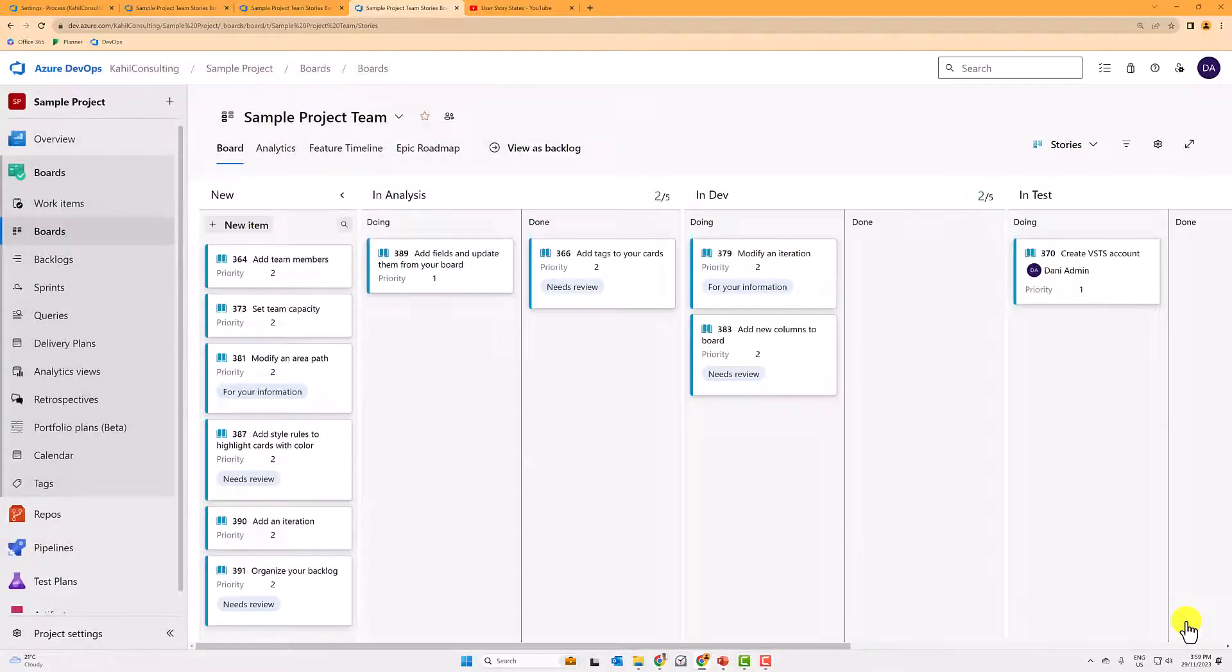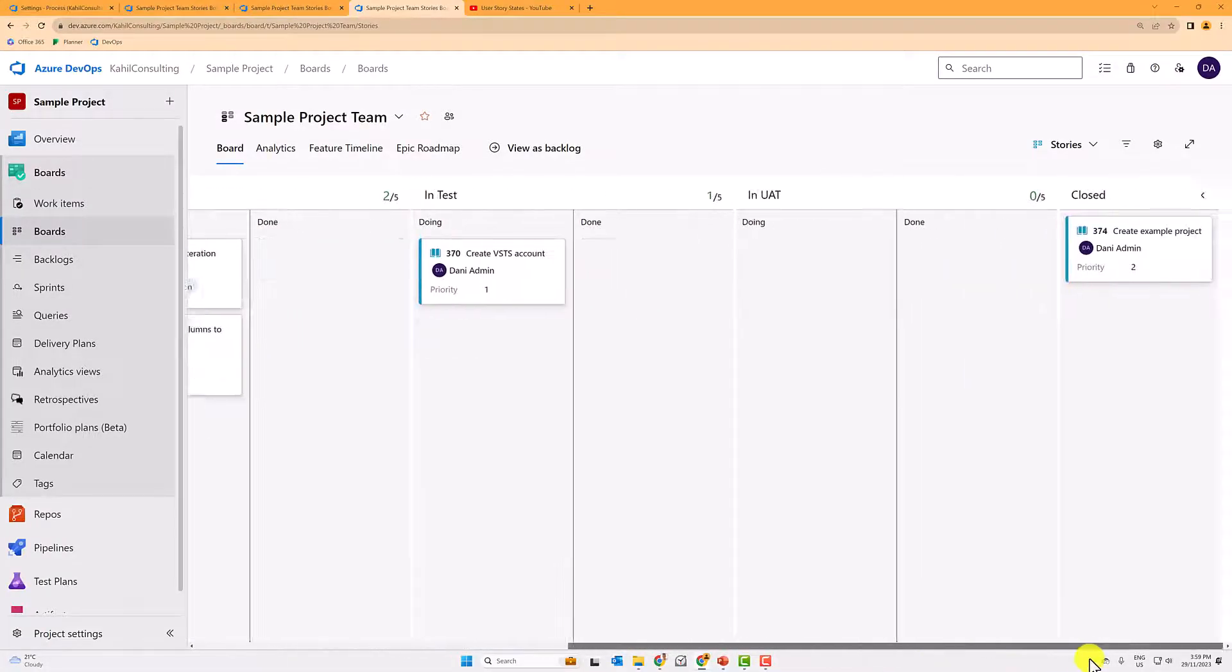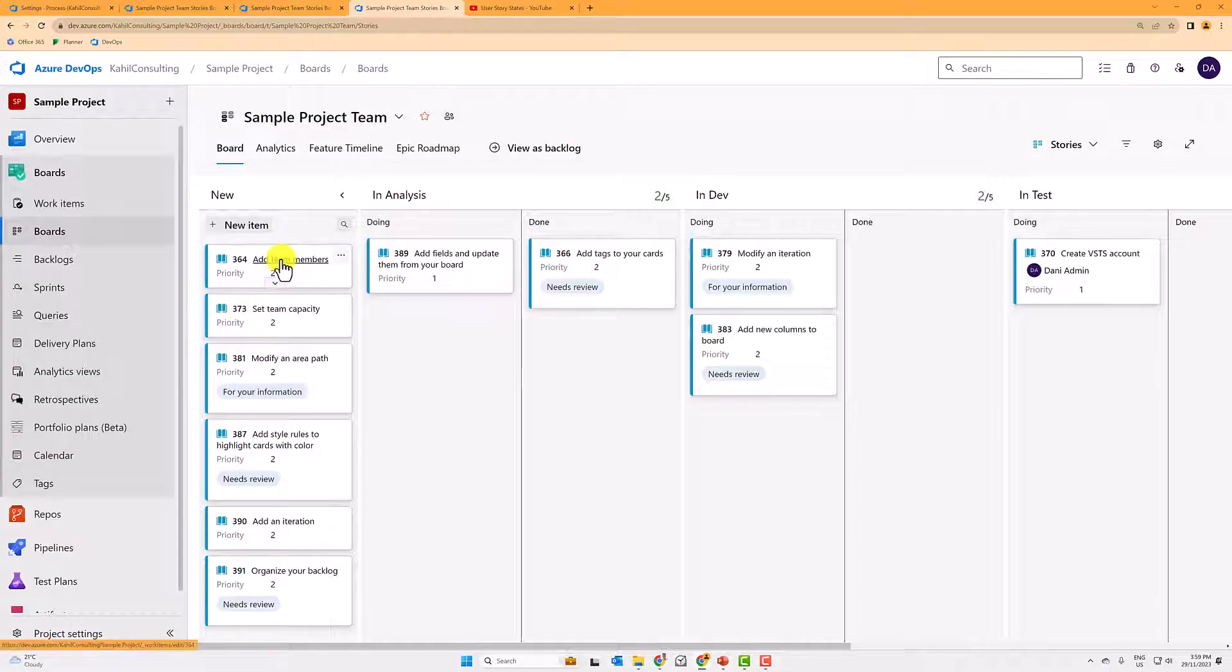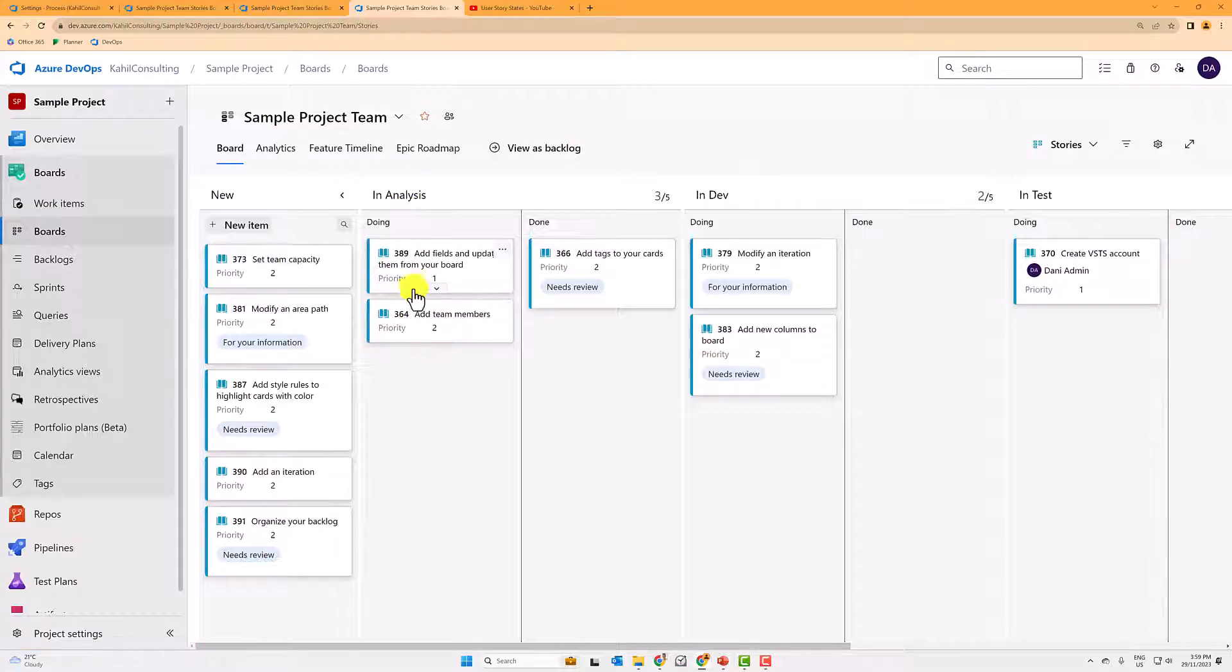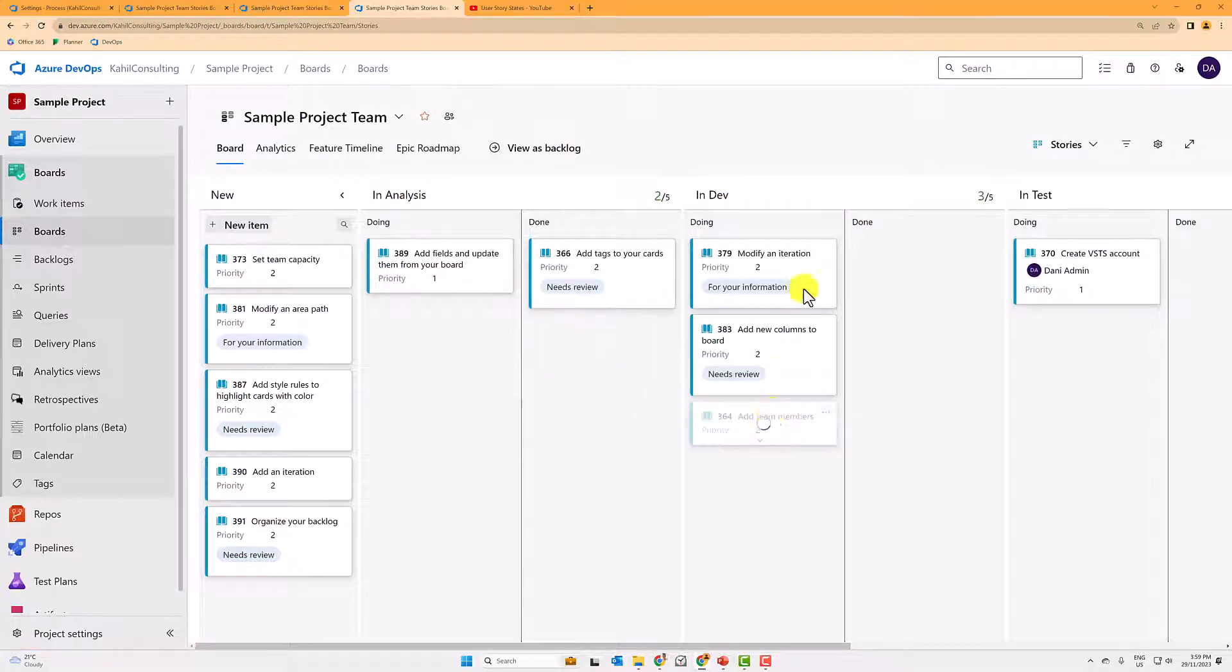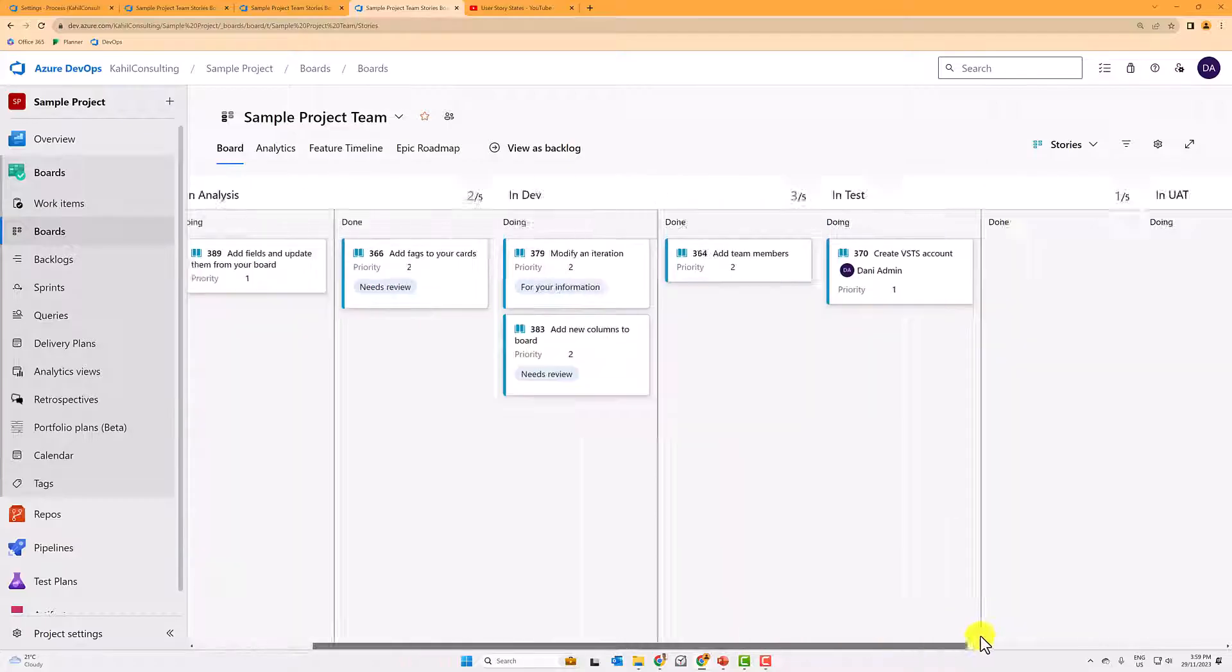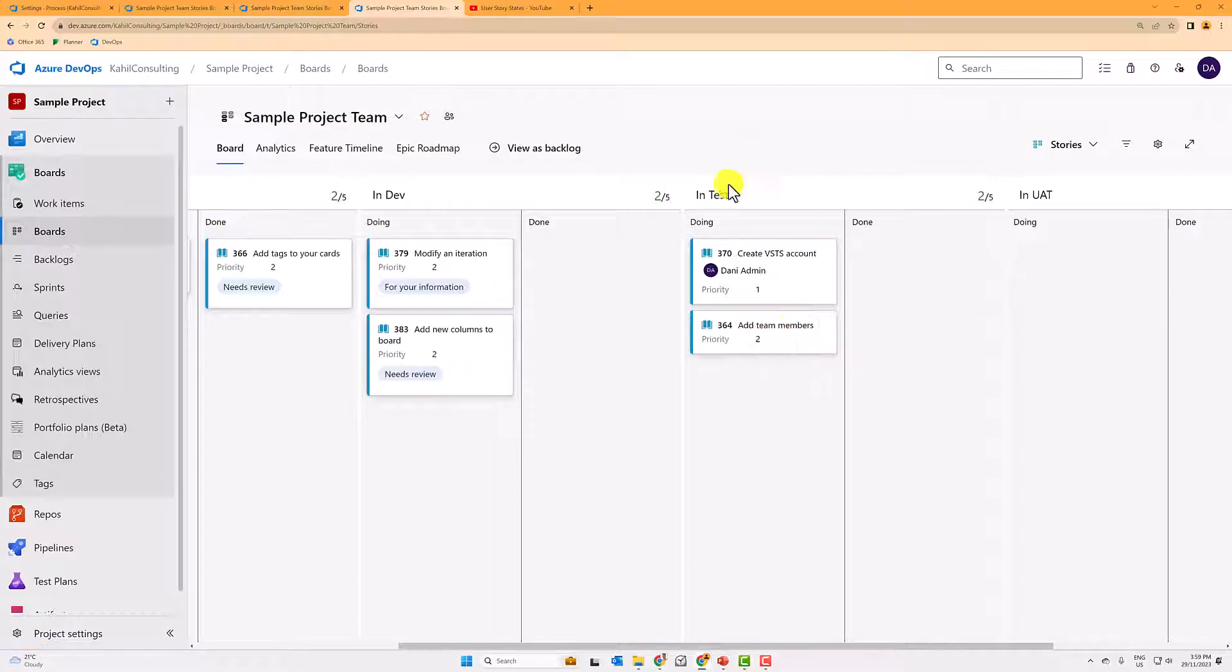If I do this, you will see additional sub-columns being created for me. And the purpose really of this is to say a new user story is being now moved to in analysis. Someone is working on that story, which is in analysis. Once the analysis is finished, it's moved to done. Then the dev team will come, start working on it. Once the dev team has finished, it goes to done. And then you have your test team that will pick up the story and start testing and then moving to done and so forth.